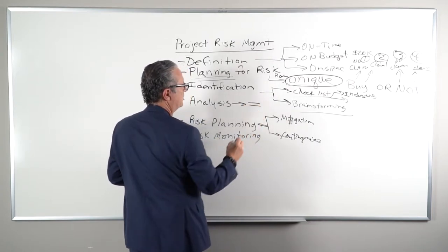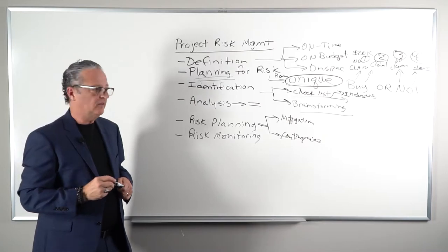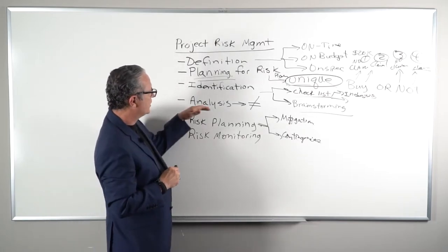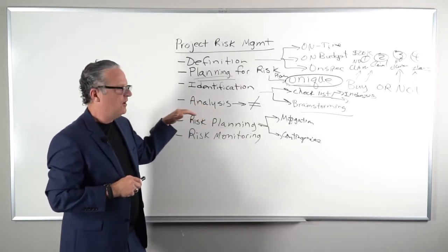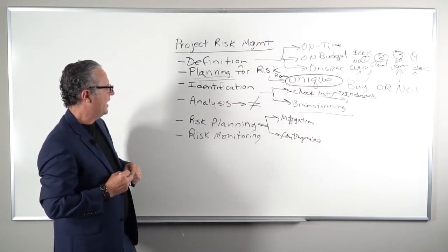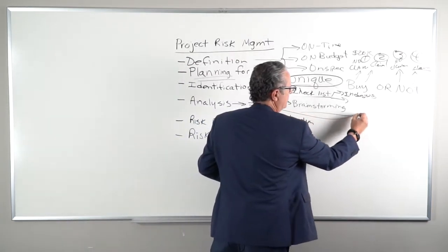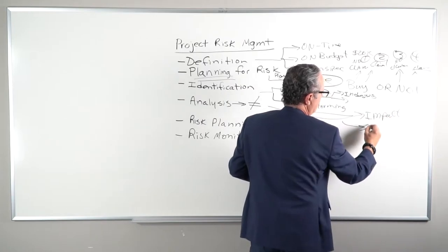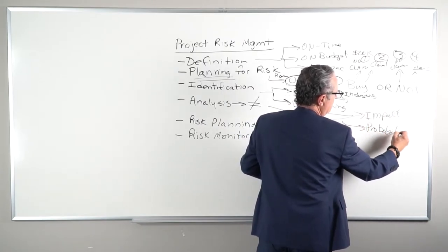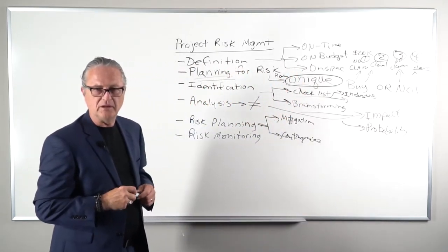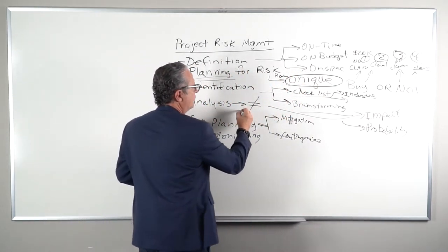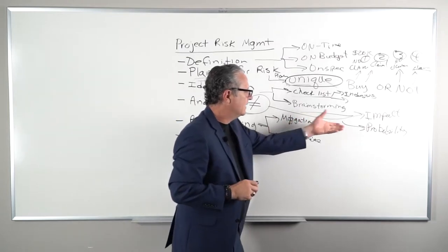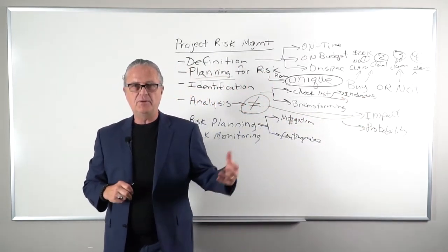are all risks created equal? And the answer is no, they are not. So now we have a sorting process, an analysis process to put these things into categories. So how do we analyze? Well, typically we're thinking about something like, what is the impact of that risk and what is the probability? They're the most common vectors or measurements to tell us how different these risks are, because they're not equal. So how can we give them weighting, a prioritization of impact and probability?